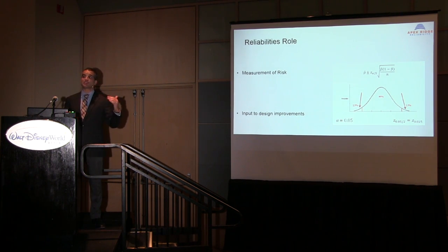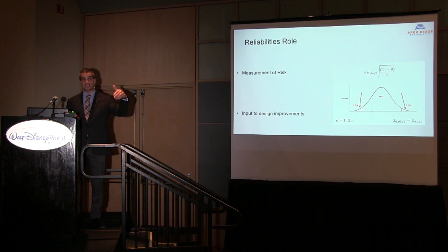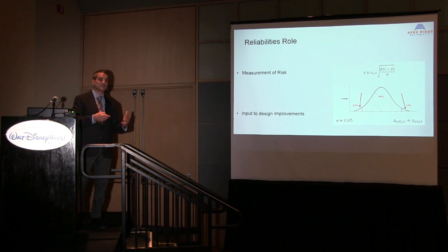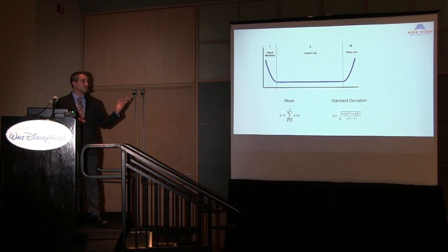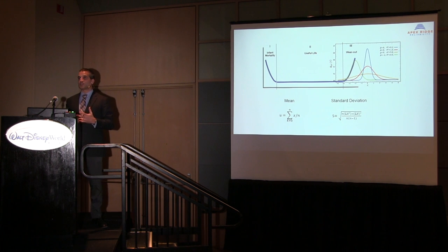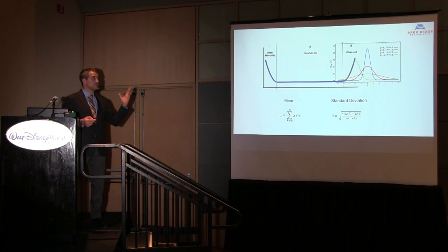Not to mention a test occurring and having a failure and using it as design input the way it's supposed to be, and then that new design getting put back into test. That could be a complete restart. So getting this into the schedule in advance and saying definitively it's going to be this long as this program phase is very difficult. I mean, take a look at one of the most common questions we get. When is this going to wear out? Right? We're at the end of the bathtub curve.